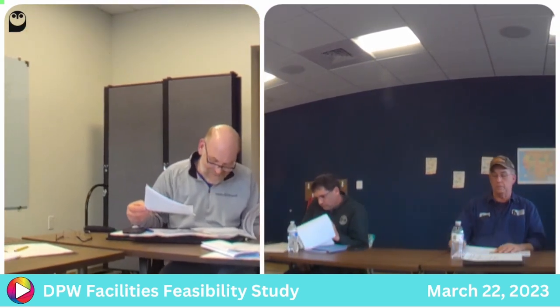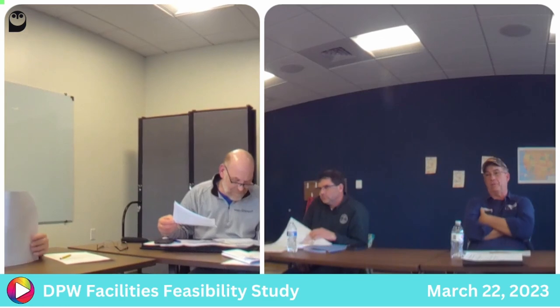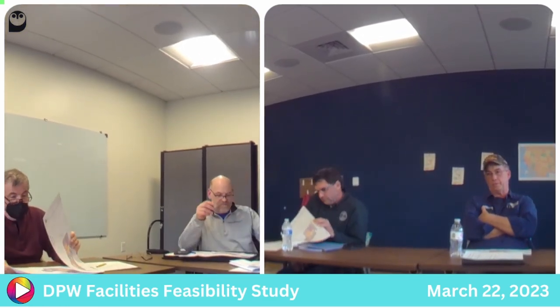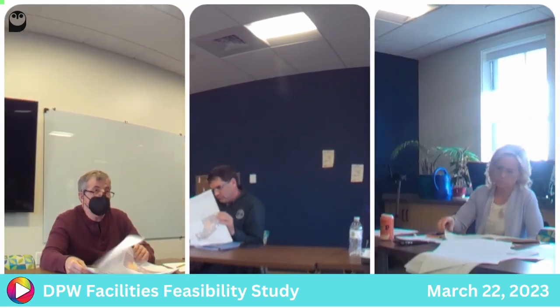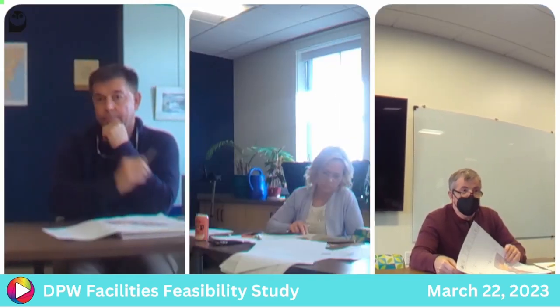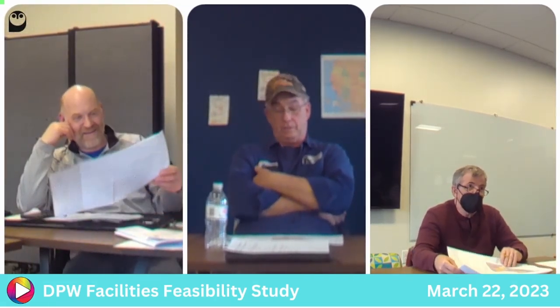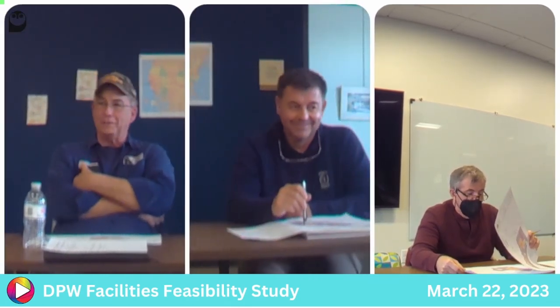It's going to be more. The other thing that we're forgetting here is if we were to do concept one, then you've got no place to do anything, because you're tearing down that building. Correct. Now you're going to be renting a place to work. We could not include temporary facilities. They'll be using your home office, Gary. I'll be retired by then anyways, but that's fine, I understand.